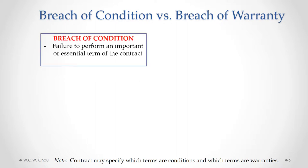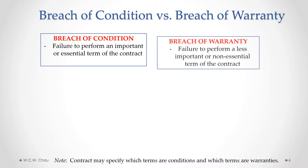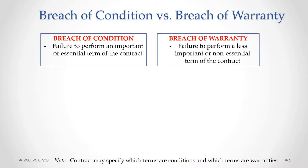A breach of condition is where there has been a failure to perform an important or essential term of the contract, while a breach of warranty is the opposite — it's a failure to perform a less important or non-essential term of the contract. The difference between the two is significant because the legal consequences that flow from the breach are different.